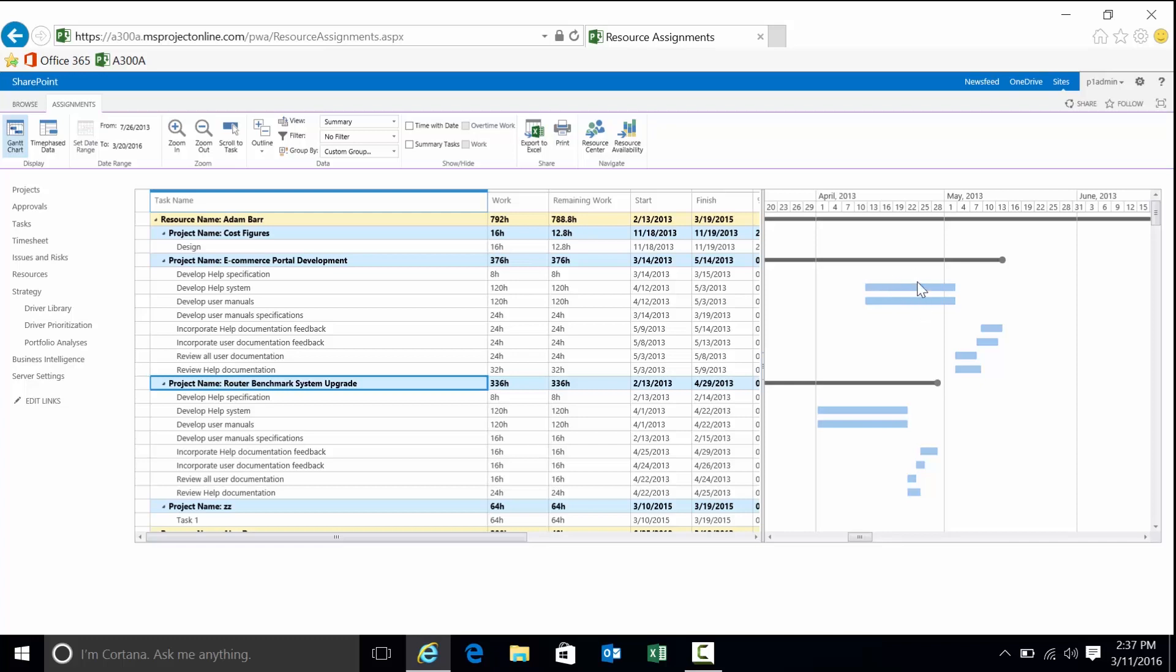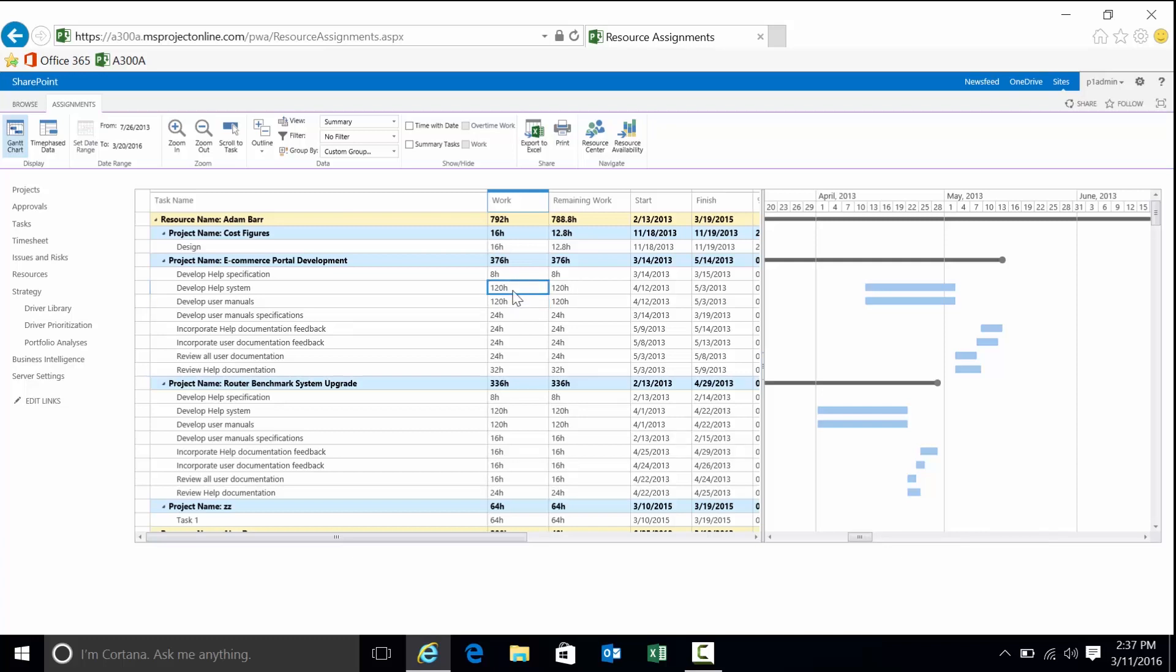If I don't, I can knock on the door of the other PM and work out some kind of arrangement to replace them. Let's try to find out what the specific issues are. Here are the two projects, e-commerce, router benchmark. If I look at the Gantt chart, I can see overlaps. It's not guaranteed that an overlap is going to be an issue. It's only going to be an issue if he happens to be assigned more than 100% of his capacity to do work on an overlap. But let's look, two overlaps here, start and finish at the same time, 412-53. You're looking at a three-week time period. This is assignment work, not task work. It's his assigned work. Three-week time period, 120 hours. That is a full-time FTE on each task. Therefore, 100% overallocation there.